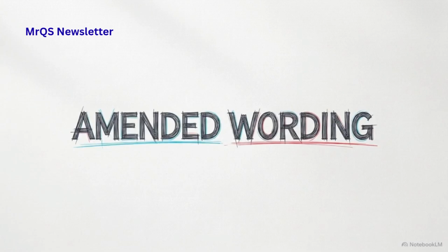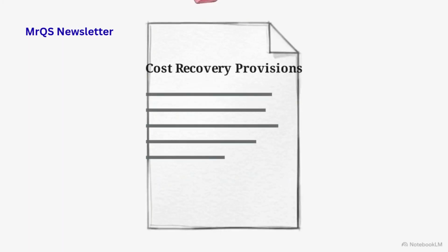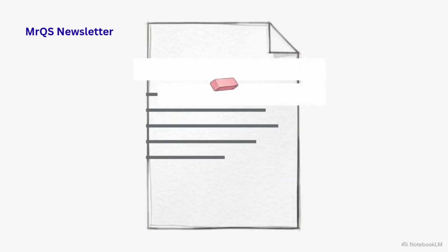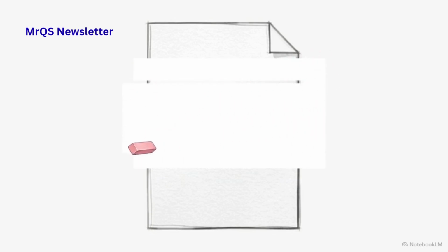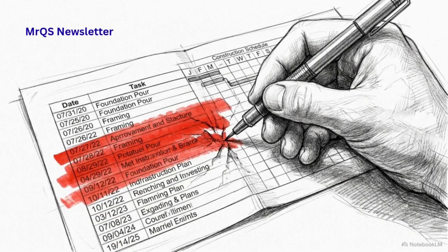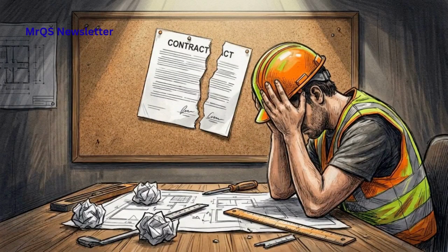By removing those 6 words, the contract is left to say simply, "omission of any work." Employers often go further, scrubbing the provisions that allow you to recover expenditure when a major omission leaves you with unrecovered costs. On paper, this grants the employer significant leverage. They hold the power to reduce the scope at will. For many contractors, this deletion feels like a total loss of leverage. The express FIDIC-based argument they relied on is gone.